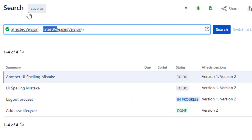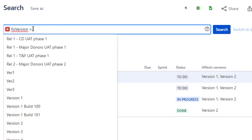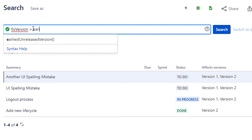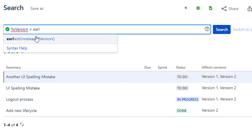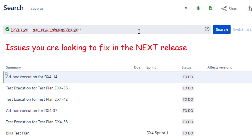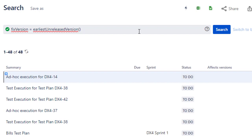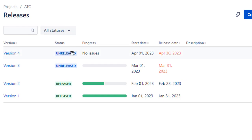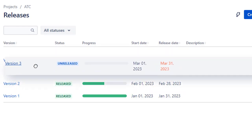The equivalent for unreleased issues is fixed version equals earliestUnreleasedVersion. Think of this as finding the issues you're aiming to fix in your next release — the release that hasn't gone out the door yet. Version order for unreleased versions is again dictated by the order on this screen, not by the dates you've used.